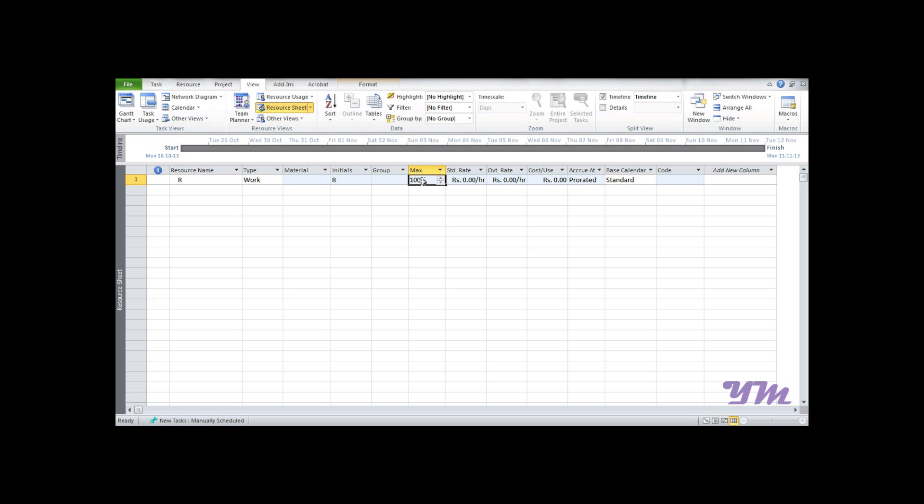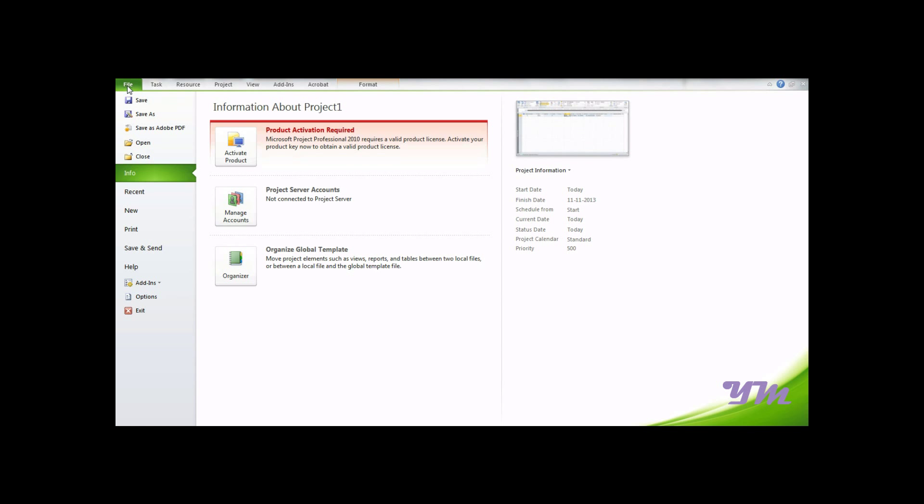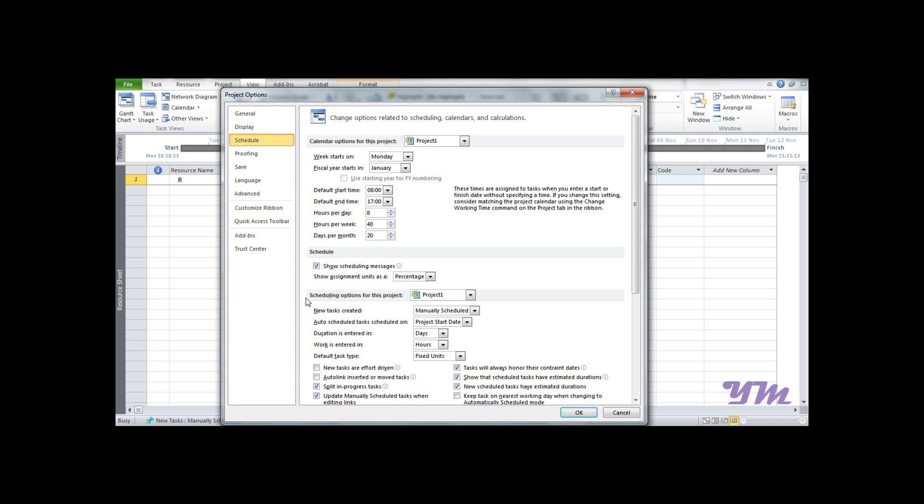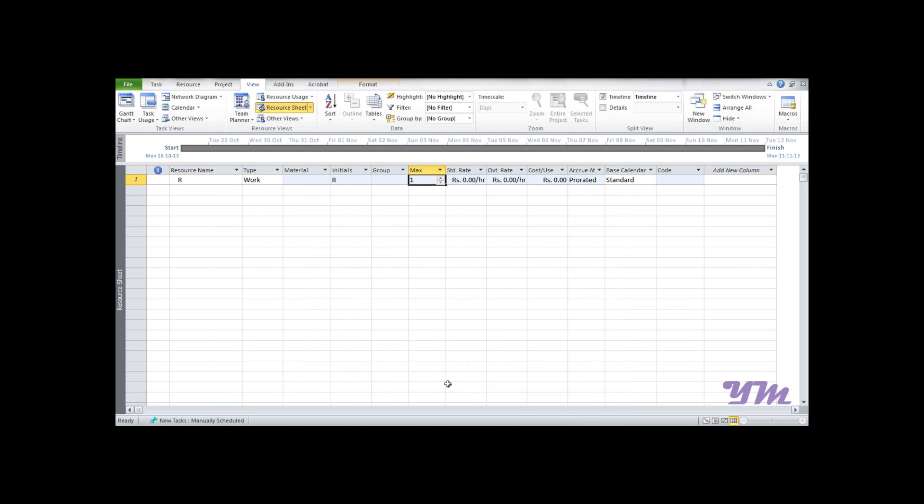To change this to decimal value, go to File > Options > Schedule, and here under 'Show assignment unit as', change this to decimal and click OK.